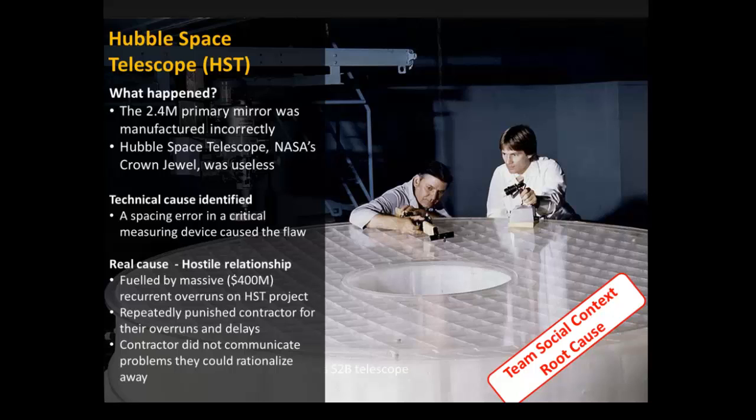speak to NASA, and there was a schedule overrun or a budget overrun, and there were a number of these on Hubble, NASA gave them a bit of punishment. And by punishment, I mean a fairly hard slap to the head. Now that was default normal contract management style at the time. Well, it doesn't take very many slaps to the side of the head to realise that if you don't have to raise something as a problem because you've been able to rationalise it away, there's nothing really wrong there, then you'll do that by preference to being open and discussing.